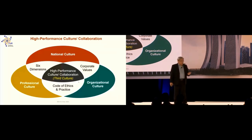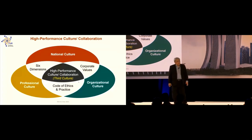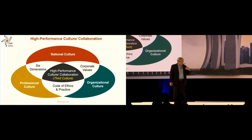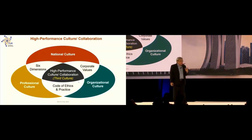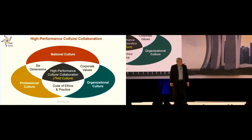In Indonesia, I must understand that every day the staff go for sambayang — their prayer. You cannot tell staff they cannot go. On Fridays, we have to update all project reports, so we schedule that from 12 to 2, when the non-Muslim staff handle the updates. At 5 o'clock we analyze together with senior management. The union initially questioned why all non-Muslims were in my PMO — I had to explain this scheduling rationale, and they understood.